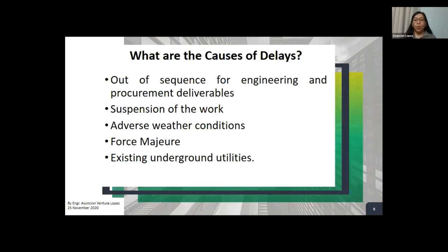1999. Now, you have to refer to your own contract first and find the clauses related to these delays before you prepare your EOT claim. You have to remember that any delays occurring due to events that are in the list are usually excusable. So if it is excusable, you will be entitled to an extension of time.